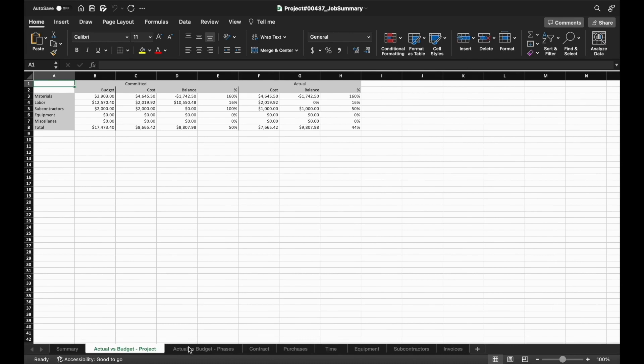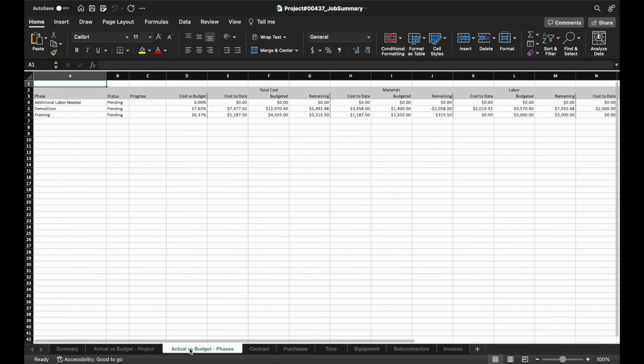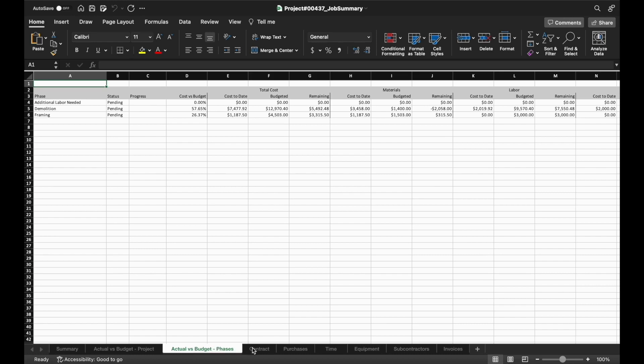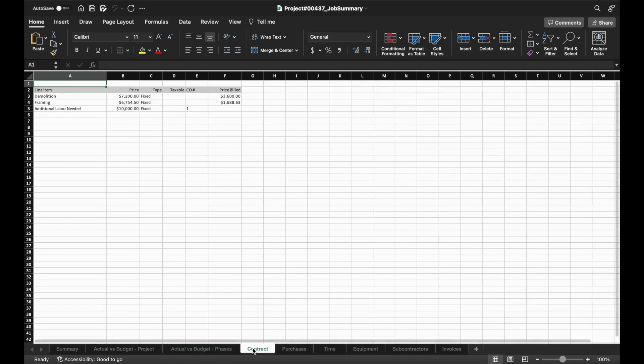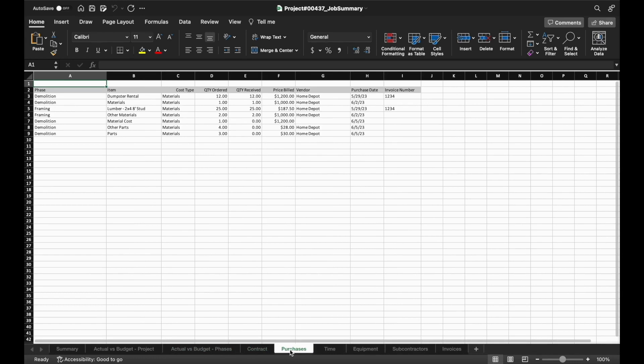Each tab below can give you more information about cost versus budget at the project level and broken down at each phase. This also includes a percentage of completion to help with progress invoicing. The contract tab includes information about how much has been billed out of each line item versus what was initially quoted.